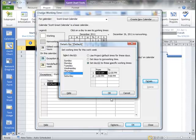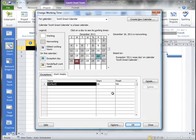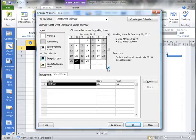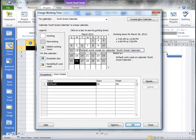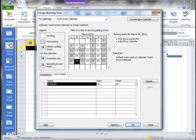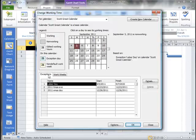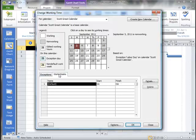So we can actually alter then. In this case, we're altering it for all of our calendars. So you can see now that our calendar moving forward is going to have all these days blocked off. So for Scott's Great Calendar, whenever we apply that to a task or a project or to a resource, it will use this information about the exceptions that we've programmed in, as well as any definitions on how the work week works.